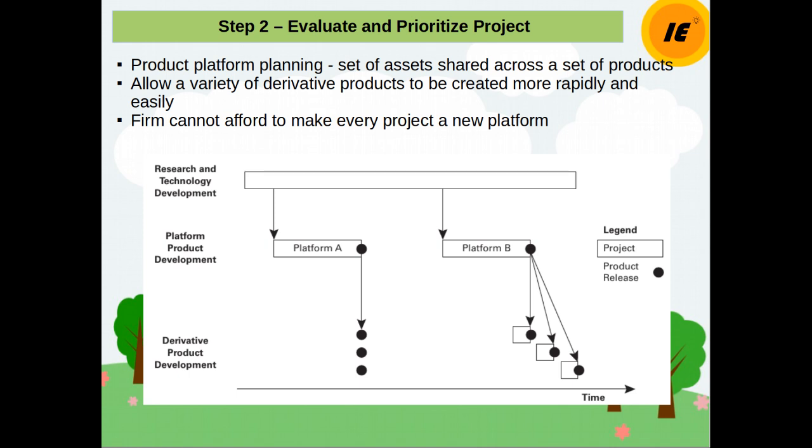To create a technology roadmap, multiple generations of technologies are labeled and arranged along a timeline as shown in Exhibit 4.7. The technology roadmap can be augmented with the timing of projects that would utilize this technology development.